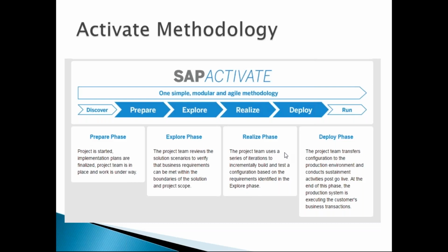So in all these conversations is where we come up with the requirements, what are to be delivered through success factors. So that requirement gathering process will all happen in the explore phase. And then realize is the main phase, where the majority of our project time will be spent, where the configuration of the product and even testing of the product both will happen. Configuration and even testing by the customer both will happen in the realize phase.